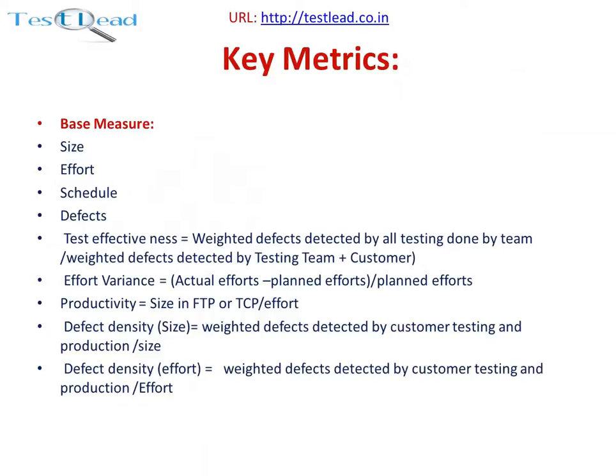Productivity equals size in function points divided by effort. Defect density by size equals weighted defects detected by customer testing and production, divided by size. Defect density by effort equals weighted defects detected by customer testing and production, divided by effort.